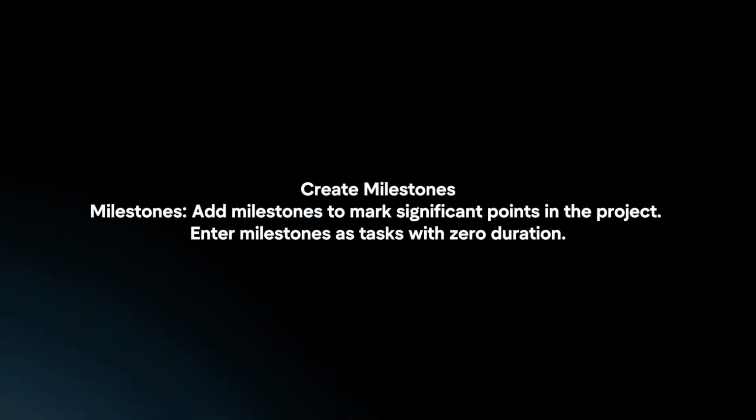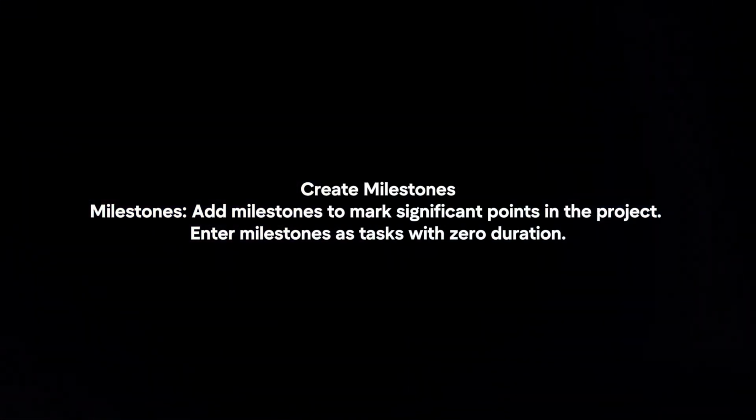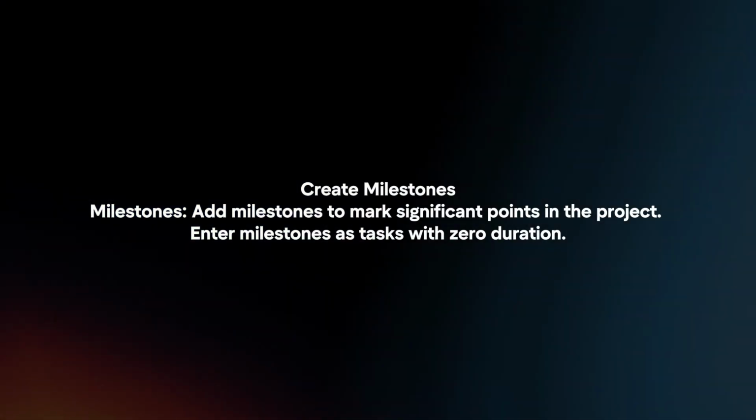Create milestones. Add milestones to mark significant points in the project. Enter milestones as tasks with 0 duration.